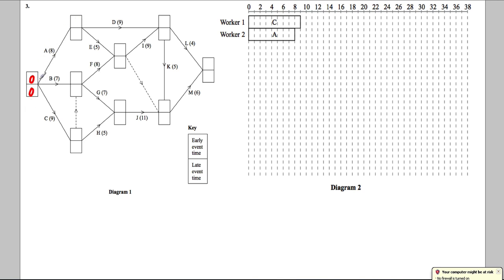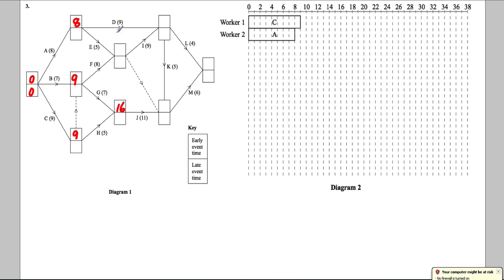How could I get to A? There's only one way, which is 8, so that has to be 8 along the top. How could I get to B? Either 7, or I could go 9 via the dummy through C. 9 is the biggest so we write 9. For C, the only way to get there gives us 9.